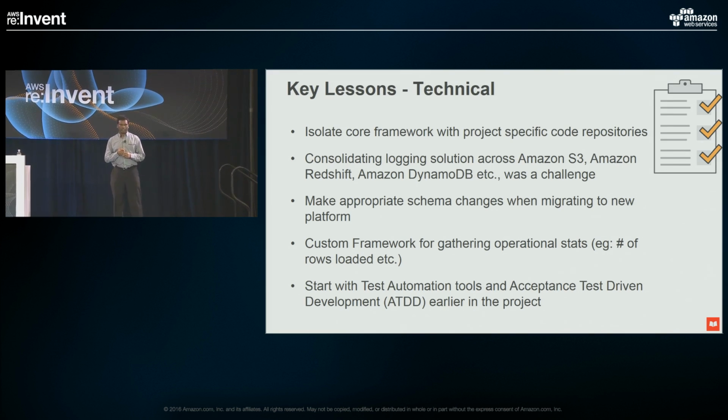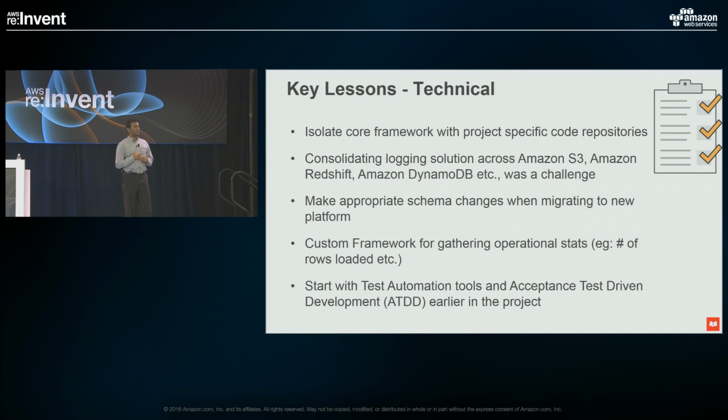And one of the things, again, if you ask us, what would you do differently if you start right now? So initially, because this was a pilot project, we made some assumptions, and we wanted to do a quick delivery of the actual MVP of the product that we were doing. We did not do the QA automation in the beginning of the project. So again, as it got more successful, we were able to onboard new functional areas, and QA remained a backlog. So it took time for us to actually catch up with the automation of QA. Again, if we were to do that differently, I would start with the QA automation, the test-driven development right from the beginning.